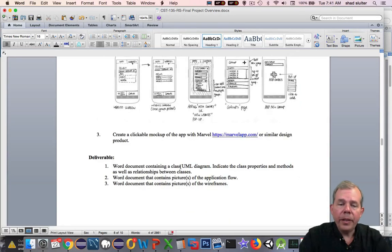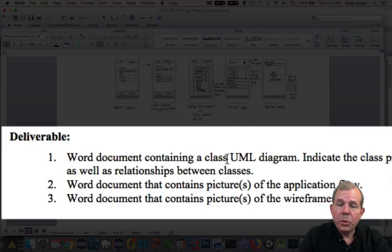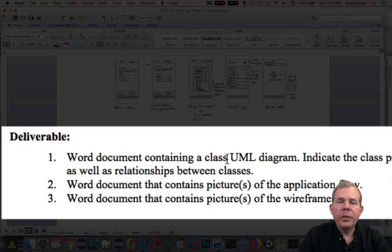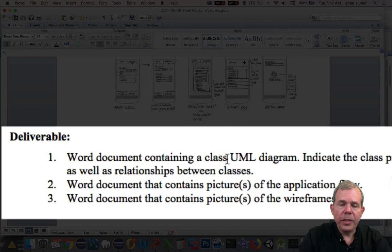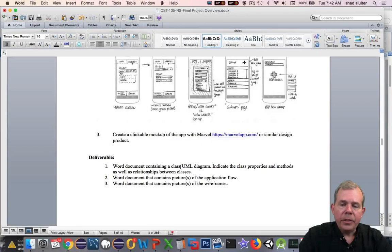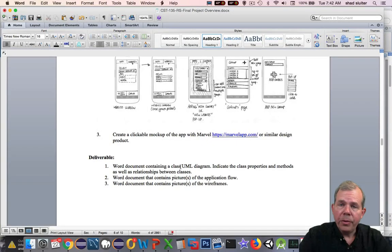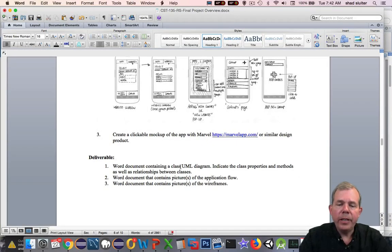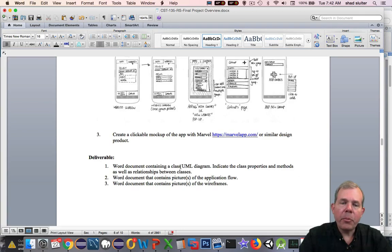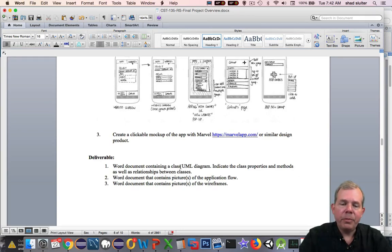So we finally get to the deliverables of our application design. First of all, we're going to have some Word documents. One will show a UML diagram of everything that you've created as far as your classes go. Then the second is showing the application flow or the site map. And then finally, the pictures of your wireframes that are built into your phone application. You'll have a pretty good idea of what your final product will look like after you finish up with these deliverables.